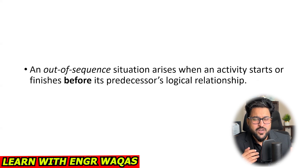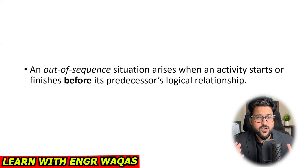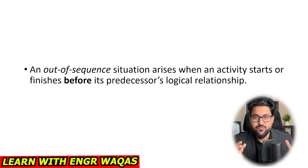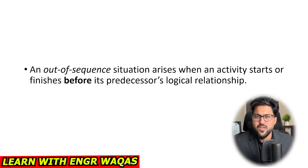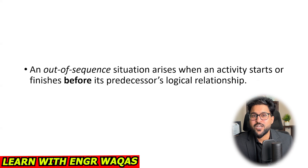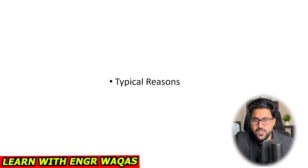When we were studying activity relationship dependency models, we understood very well that successor activities are totally dependent on predecessor activities. We already allocated all those relationships in the planning phase, but in the tracking phase the situation is different — that relationship may be overruled, which can cause an out-of-sequence activity situation.